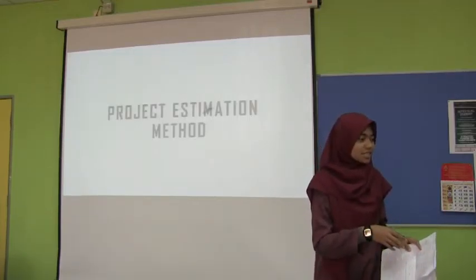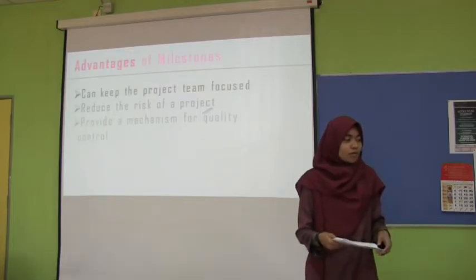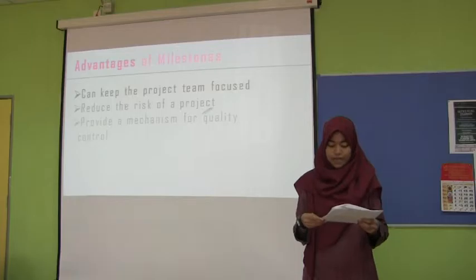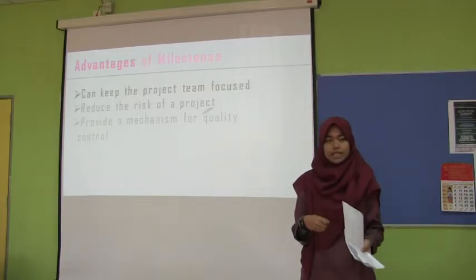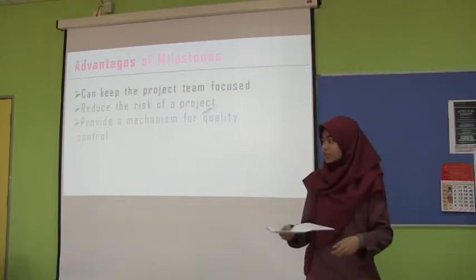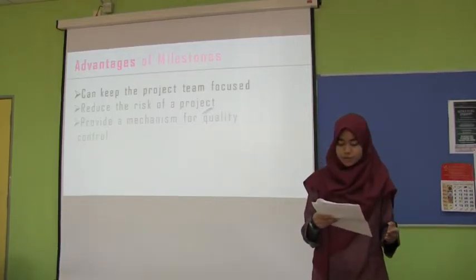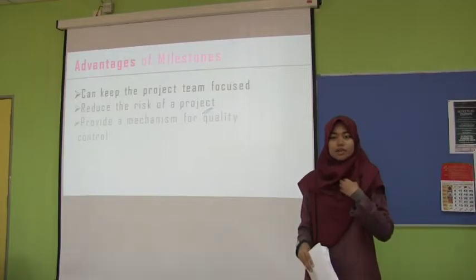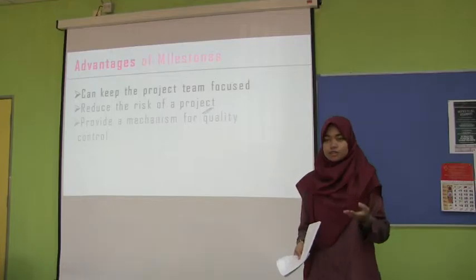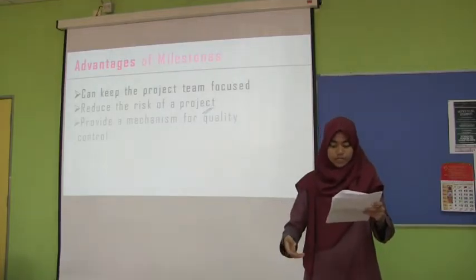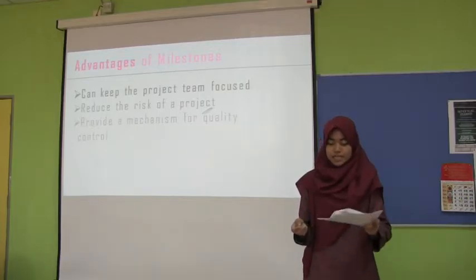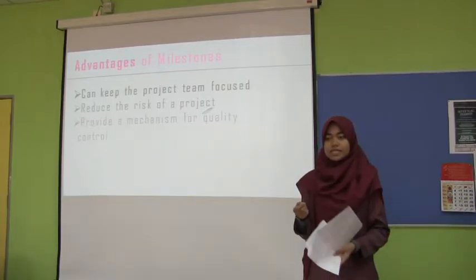And the last advantage is to provide a mechanism for quality control, where providing the user with an interface does not guarantee that the project will be acceptable to the customer. The completion of the user interface deliverable should end only with the acceptance of the customer itself, otherwise the project team will be forced to repeat or redo the project itself. In short, we can say that the deliverable must not only be done but must be done right.